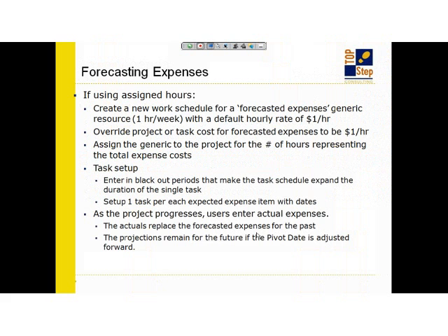And what you can do then is based on if you're using assignments, the number of hours on a task represents the amount of money that should be forecasted for expenses. Okay? If you're using bookings or allocations, the amount of booked hours or allocated hours represents the amount of expenses you expect. So basically you're faking the system out to forecast expenses by using a people approach with a person that doesn't actually exist. It's the person represents expenses.